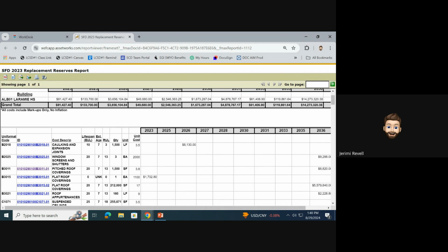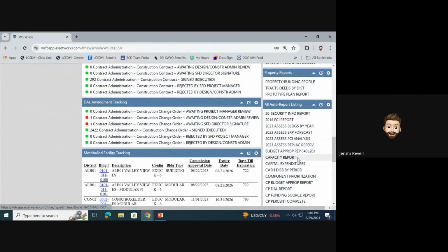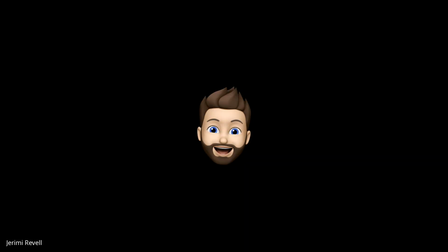That's going to lower your FCI score, right, as time goes on. But we're not necessarily applying the credit for the cost of the work as much as we are eliminating the deficiencies, because I would say in general, all of the estimated costs in here are for the repair work only.